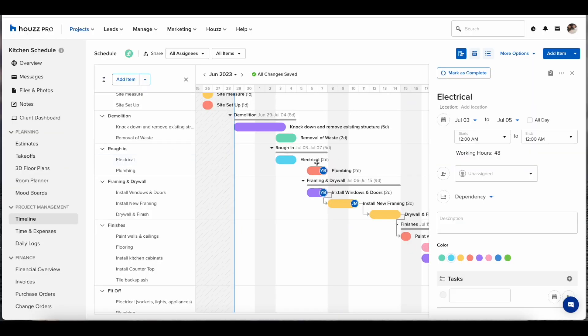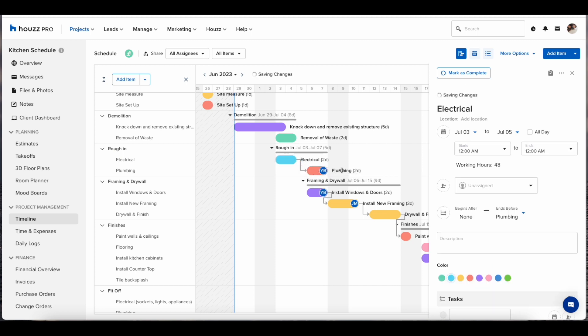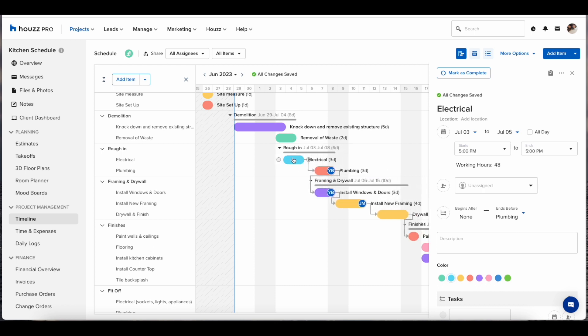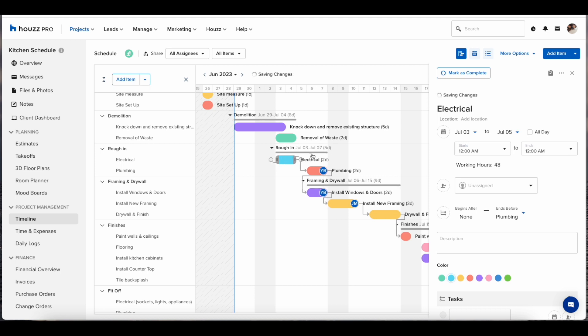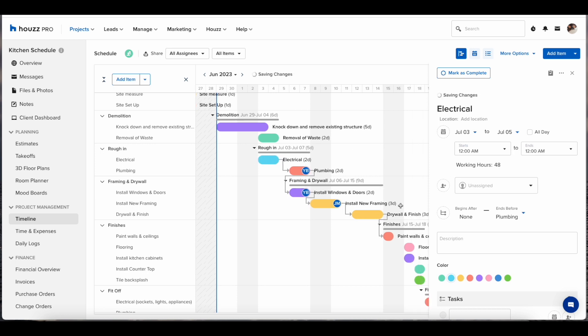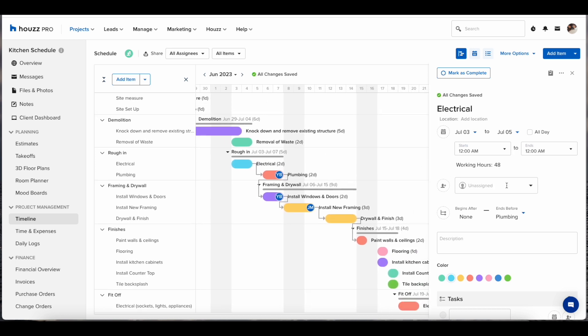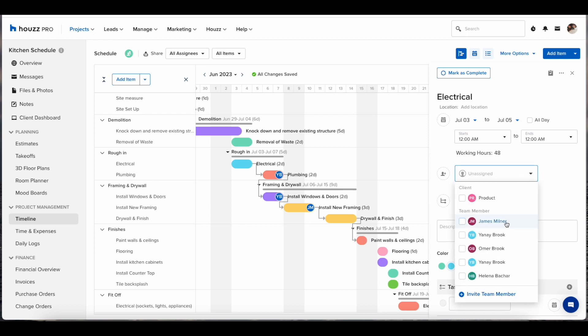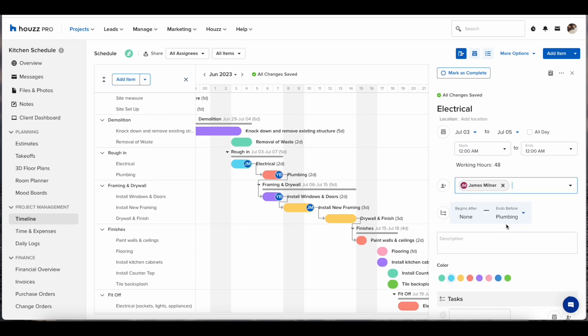We can also create item dependencies. In this example we can say that plumbing cannot start until the electrical rough-in is finished. By making these items dependent and linking them up, if there was a delay in the electrical rough-in, we can move that down the calendar which would automatically move the plumbing item. This will allow all of the stakeholders to stay up to speed on what is happening on the job.